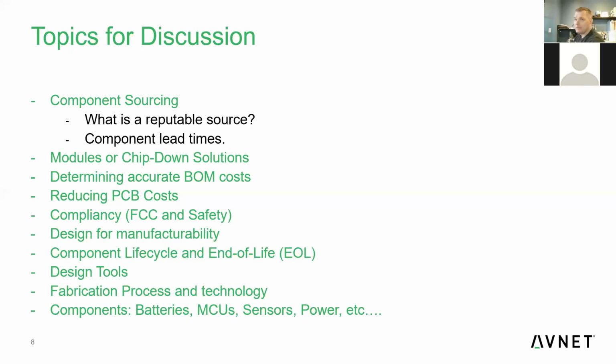Yeah, so throughout the lifespan of the product, Joel is asking, should we be quoting BOMs in that 30, 60 days throughout the lifespan of the product? I'd recommend it. Typically your pricing is good for 30 days when you get a quote. So, typically you're going to be quoting every 60 to 90 at the most.